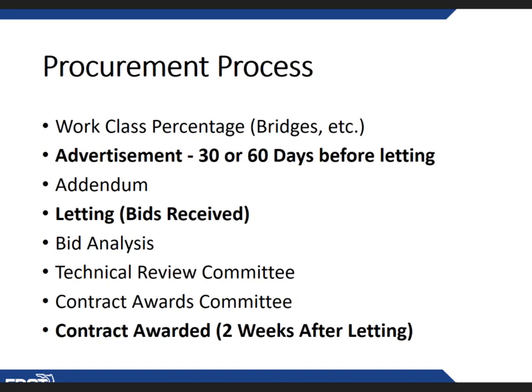The bidders bid on it. We have the letting, and then we do a bid analysis. Once the packages are reviewed, we are open. We review them for unbalanced bids. Now, project managers may be asked to help with this bid analysis process.